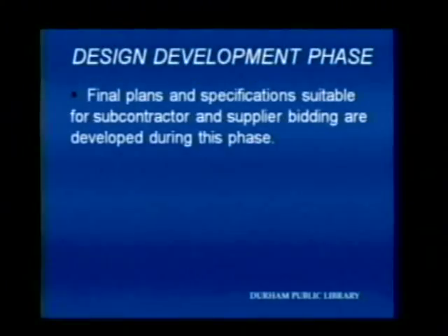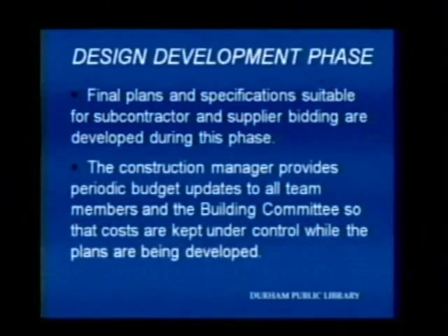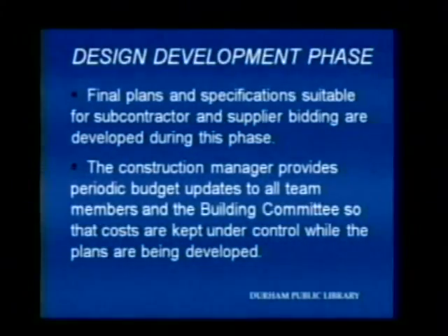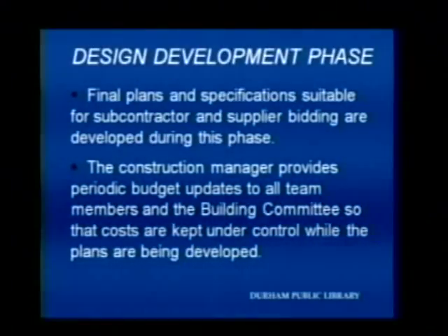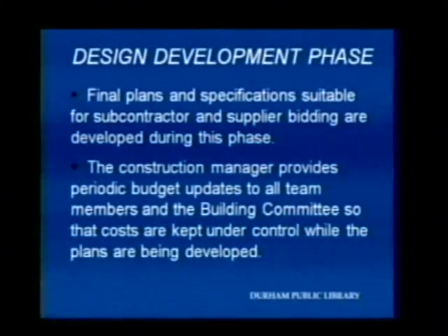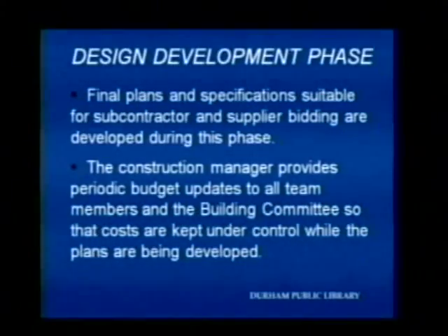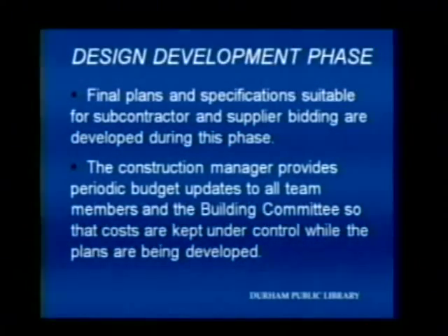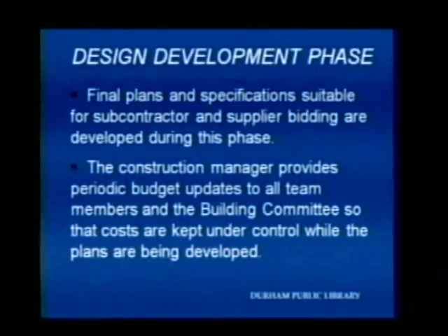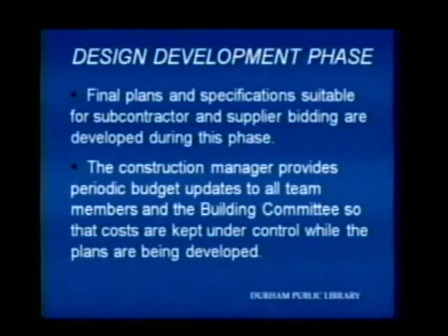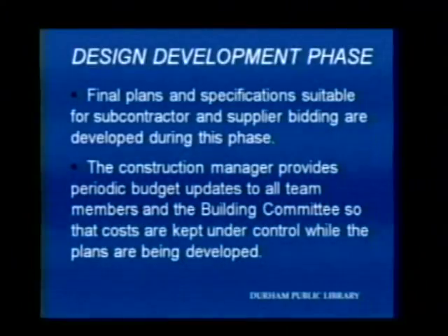Now, we're using a hybrid construction delivery system. Initially, we started out as design builders, and I'm very much in favor of what's called construction management. We prefer to do that, and the nice thing about construction management is it's very transparent. So we offered to the building committee early on that we'd like to convert into construction management format, in that we will open all of the books and they will be privy to every piece of information, every price that we collect.